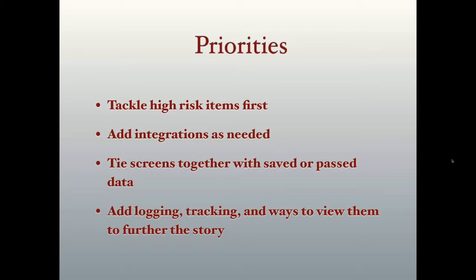Well, as you're going through, start walking through those and say, okay, I know, for example, Amazon is going to be the most complex. I'm going to have a lot of data. I'm going to integrate with them. Go ahead and make that part of it, go do that integration, have that hooked in. You can leave the other things stubbed out in simple examples, and then later you'll fill those out.